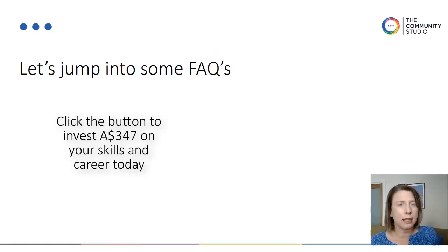It is far more likely that you will need people from across your project developing those relationships and delivering those tools. It'll probably be your comms and stakeholder engagement person. Well, hopefully you've just got a stakeholder engagement person. It'll be that person doing that strategic planning around this area, working on the capability of your team, and then helping them deliver out those tools to everybody. That is what I'd like to see a stakeholder engagement person in projects doing, rather than all of the doing around engagement. It is just not possible for one person to be working with everyone and delivering all those tools out.